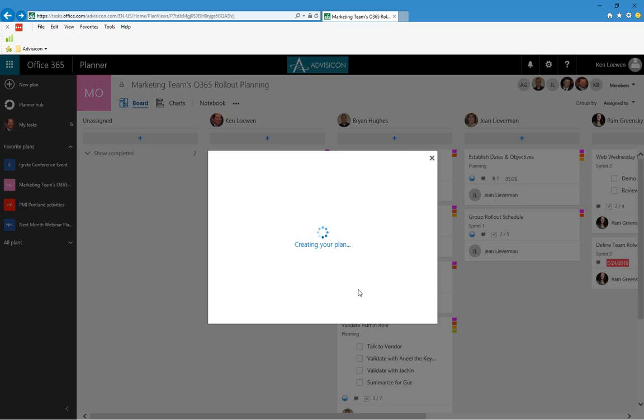So that you're not having to come in and monitor specifically each task in the plan to see if there has been an update. You can be watching things like the dashboard that we looked at to see which ones are highlighted as red for late, so that you're able to manage by exception that way. You can also, of course, institute Outlook rules for managing the population of emails that you're going to get about those task updates.